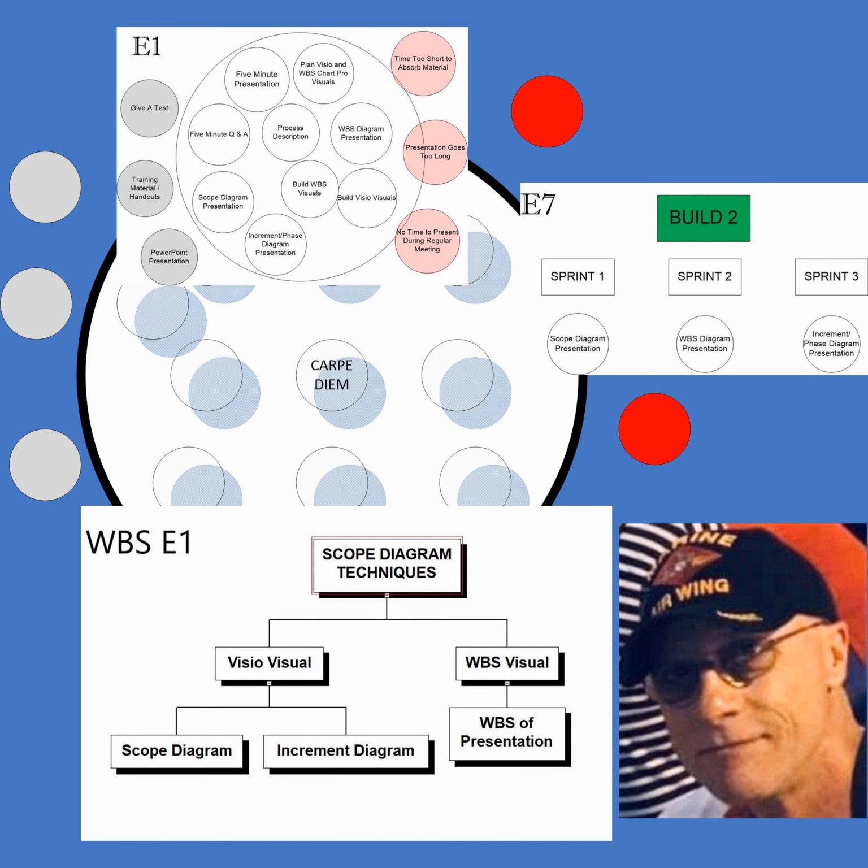3, if the system has a failover, the system owner will execute failover before it's shut down at the current location. I just blacked that out. 4, if the system has no failover, the system owner will do a backup before it is shut down at the current location. 5, the system owner has contracted with its OEMs to plan a restore from a backup. 6, all communication with associated vendors has been executed by the system owners to coordinate the restoration of systems from a backup. 7, all required system owner personnel will be present at the destination to execute a restore from a backup. These are critical systems for a company or an agency, so everyone needs to know what their responsibility is.